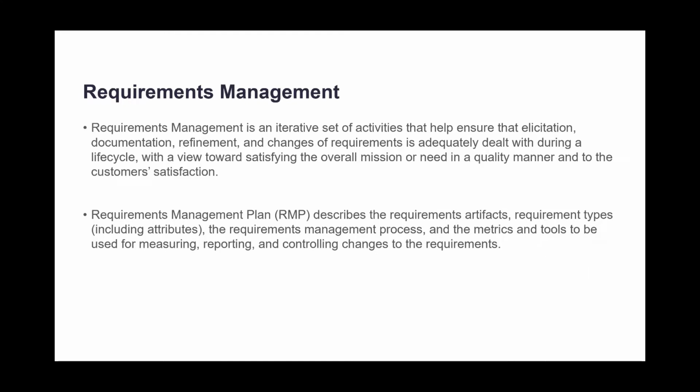In order to document how our requirements will be managed, in a project there's always an RMP, a requirements management plan. Sometimes it's part of a systems engineering management plan, SEMP, and sometimes it's not part of that, depending on the project or needs of the client. Clients might say that we need a separate RMP document because it's such a big, complex project, or they might be comfortable with merging it with other documents.